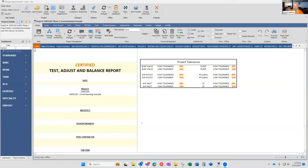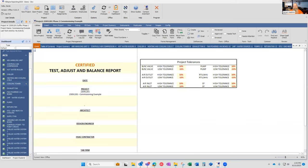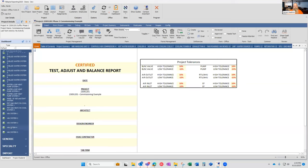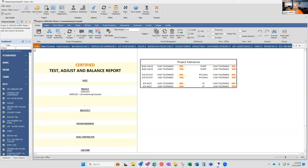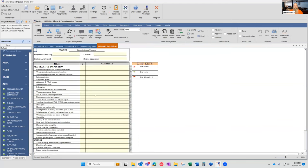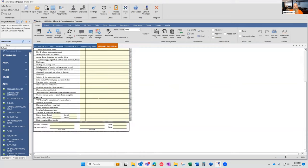When you load the application, you're going to see a data container. This piece inside here is what you can change to make it your own. Currently we have the ACG forms and commissioning forms in here. If you didn't have your own commissioning forms, you could start by using the ACG forms included in our system. To add a form, you simply select it and click the button to add it.